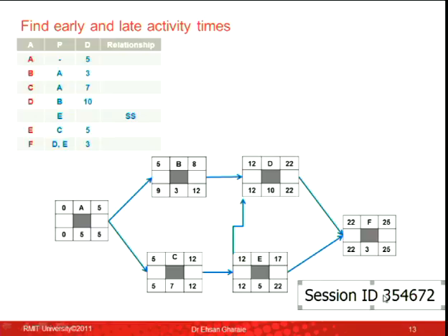And it's important because the table is telling me that the start of D depends on the start of E. If you go the other way around, you're saying that the start of E depends on D, which is not the case. So E is the predecessor to D, that's why the direction should be from E to D. And it is a start-to-start relationship, so you can see that it's from start to start.